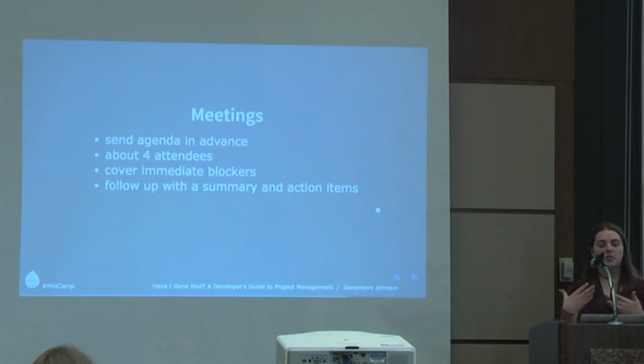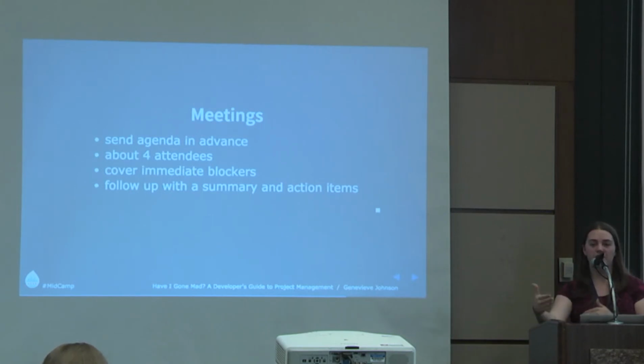And to keep the project moving forward, cover what your immediate blockers are. It's really easy to look 3 months out into that feature that you're really super excited to get to build, but if you're not there yet, it might not even be worth your time to ask your client about it if you're not going to get to it in 3 months. Don't derail your train. And then always make sure to follow up a meeting with some sort of summary and a list of action items and who needs to do those things.